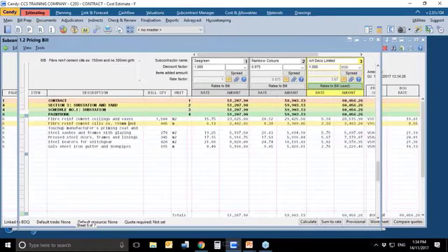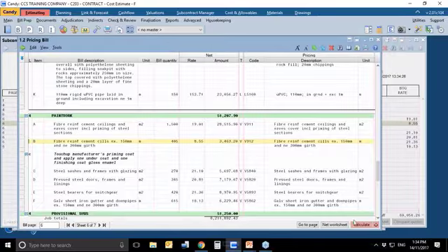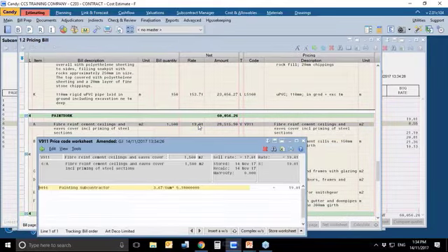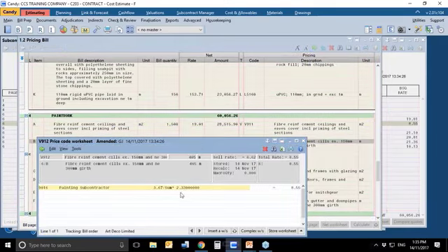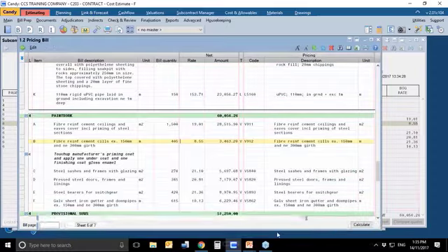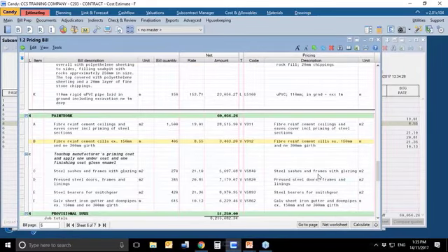If I double click on the items, it will show me the total on the BOQ. For the painting items on the BOQ it is 60,056. How do these rates come by? There you go. Painting subcontractor, 3.67, which is the currency conversion factor, multiplied by 5.18, which is the rate in USD quoted by Art Deco. I'll go on to the next line. Rate in USD quoted by Art Deco. So it's very quick to be assigning currency codes when subcontractors are quoting in different currencies.